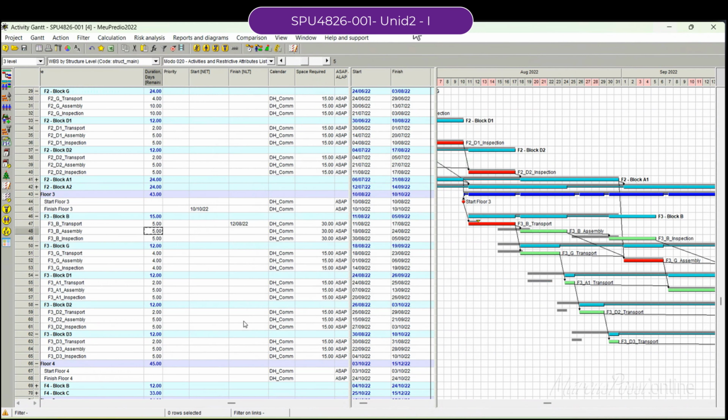Your activity was not stopped on August 12th. It was not stopped. Okay, the schedule flows naturally. Yes, that is different. In P6, an activity that must finish will not push your schedule. Here it is, of course, flexible. Even if you put a constraint, the calculation respects not earlier than, because it's possible not to start before. Not later than, even if you have some predecessors with different durations, it will not start before.